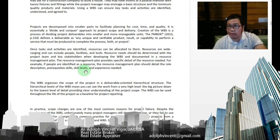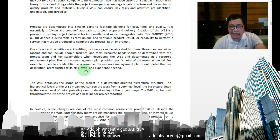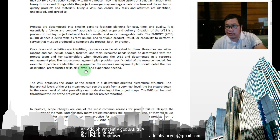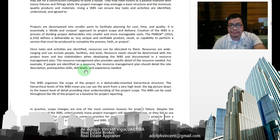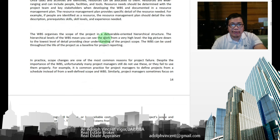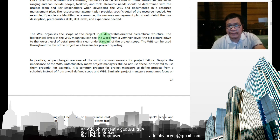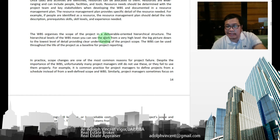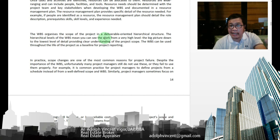Resource needs should be determined with the project team and key stakeholders when developing the WBS, especially for large projects, and documented in a resource management plan. The resource management plan provides specific details of the resources needed — for example, if people are identified as a resource, it should detail role descriptions, prerequisites, skill levels, and experience needed. The WBS organizes the project scope in a deliverable-oriented hierarchical structure and can be used throughout the project life as a baseline for reporting.